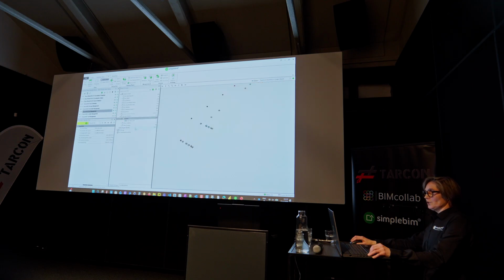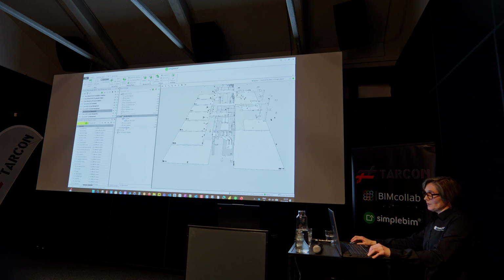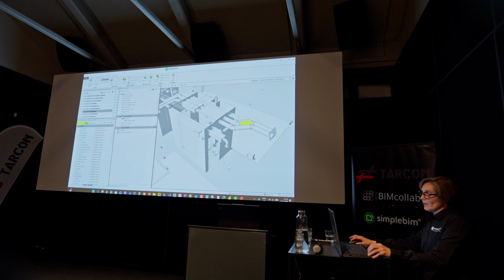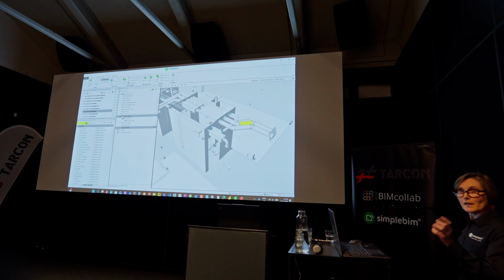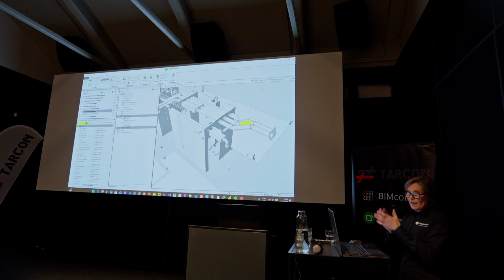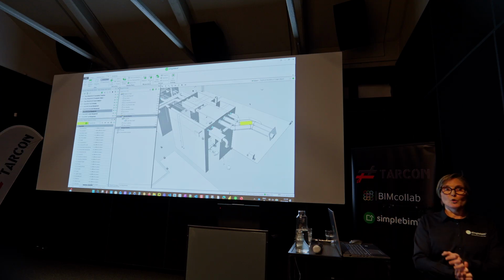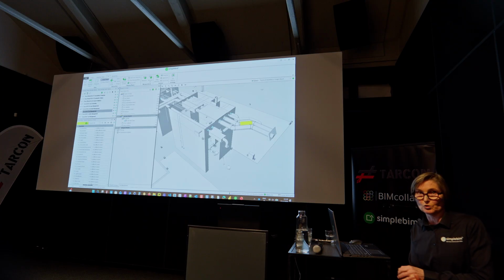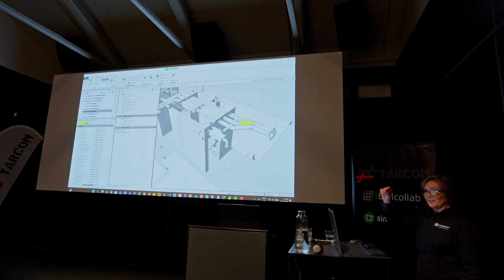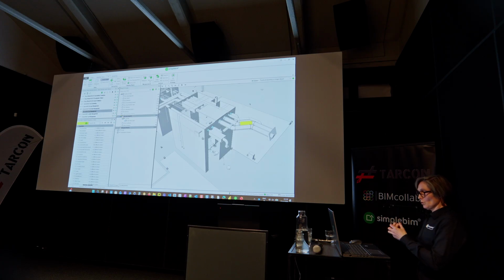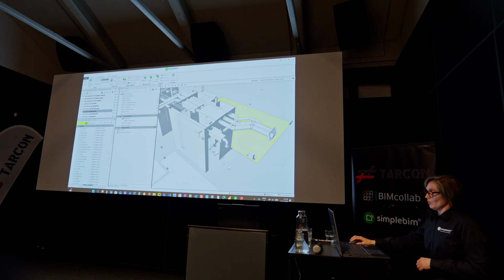So what I wanted to automatically generate and find is when these, and now I selected only ventilation ducts against specific not supporting partition walls. Again, from data keys. In every single project, I want to find the inlets for the walls, not supporting walls, where a hole needs to be drilled for ducts.